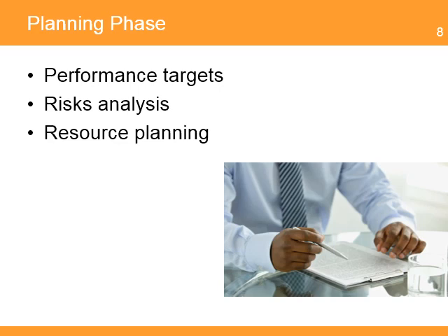For example, the new water and sanitation project develops the detailed implementation plans, identifies the schedule for key deliverables, and the targets to achieve the project outputs and outcomes. Additional information that is submitted includes the project risk analysis, the resources the project will use, including the support from the administrative area of the organization. This last component is critical to determine if the administrative units have the capacity to support this new project. The level of importance of this project will help determine the priority in getting support from the administrative units.